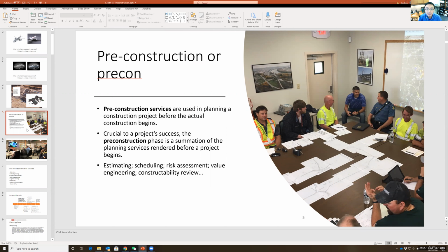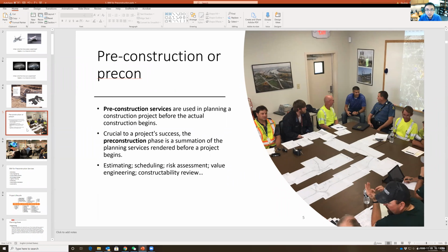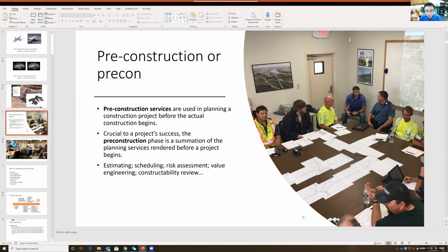A lot of you are trained as engineers. You probably think the image in your mind for the builders is people with a safety vest doing the concrete pouring or the tower crane heavy lifting. Actually, no. A lot of general contractors outsource a lot of the work. I don't know if you guys know that. For a particular commercial project, we usually have around 10 to 15 subcontractors, and most general contractors only do the concrete and the surveys.